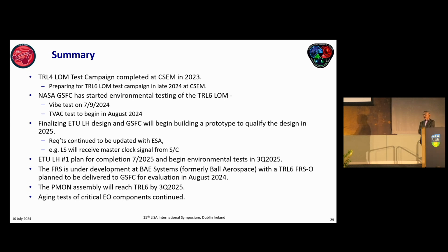Many factors, and that's why we identified a few critical components. For example, the pump diodes within the main oscillator are one of our concerns, and we started working with a vendor to do live tests and make sure that we have a certain FIT value that would meet our requirements, and that is ongoing.